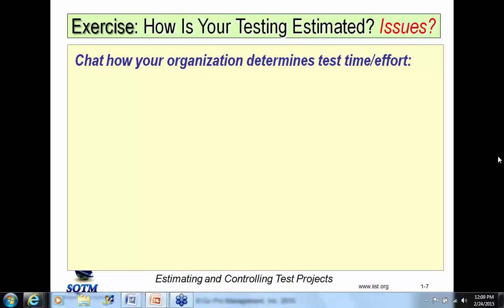ROM. Okay. For the first high-level estimate, we use basic development hours. Then it's refined based on the scope and requirements and the work breakdown structure. How long did it take last time? Well, that's interesting. Of course, you're not testing what you tested last time, and there's a real issue of how much this project relates to that. It may. 50% of development effort. Well, here's somebody who's already got a better crack at it than if you've only got 20% of development effort.